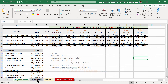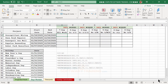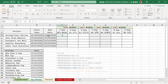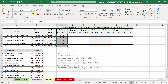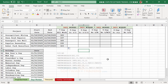Now we move to NETWORKDAYS, which is like the cousin to WORKDAY. Instead of calculating a future date, we know both the start and end dates and need to count how many days are in between. If you work every day — Monday through Sunday — the calculation is simply the end date minus the start date. We type equal, click the end date, minus, click the start date, press Enter, and copy down.